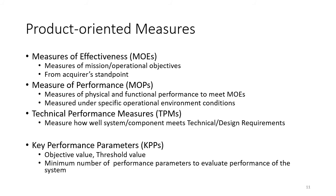The third tier is technical performance measures (TPMs), typically done at the component or subsystem level, showing how the system meets the technical design requirements. So the three levels are: the operational MOEs — mission and operational objectives; the MOPs — functional and physical performance measures; and the design-level TPMs.